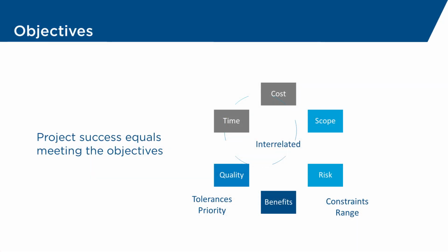Additionally, we need to consider, when we're describing these, the use of tolerances, because of course early on in the project we can't be sure about time and cost. We'll only know that at the end. But whilst we're estimating, we might like to put a tolerance around the time and cost. Of course, if you're running an agile project, then time and therefore potentially cost are both fixed. We can't change the quality, so therefore scope would have a tolerance.